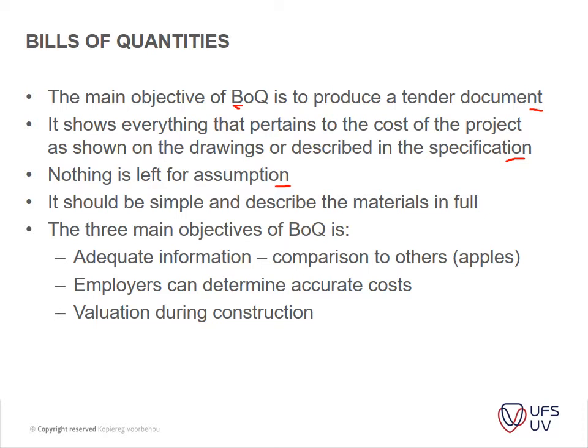The three main objectives of the bills of quantities are: to provide adequate information for comparison — the main thing is to compare apples with apples; employers can determine accurate costs since you have as much information as possible; and it allows valuation during the construction process, which is very important. If you only have a quote per square meter, it's difficult to determine exactly what to pay the contractor because you can't measure it against what he quoted.